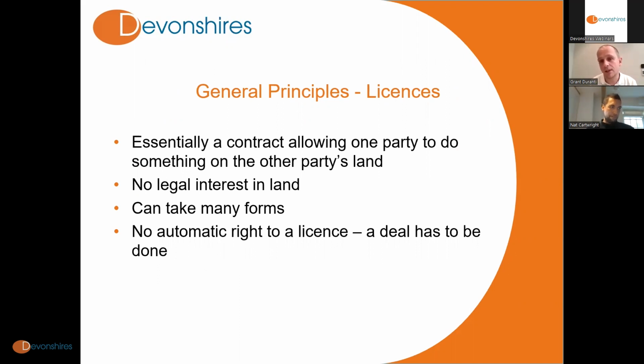A license doesn't grant any kind of legal interest in land. You can get rights by deed, you can get rights included in a transfer, which would bind the land and therefore carry on. So if one party sold their land, the person they sell to gets the benefits of those rights. That isn't the case with a license. A license is personal to the parties that have entered into the license. So it just sticks with those parties, and in the event of a transfer, it doesn't carry on.